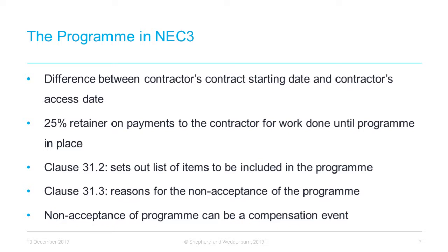A preliminary point to note is that there is a difference in the program between the contractor's start date and the contractor's access date. Therefore, there might be quite a lot of activities that are required before the physical works start on site. You cannot start work on site until the access date, however that could be sometime after the starting date.